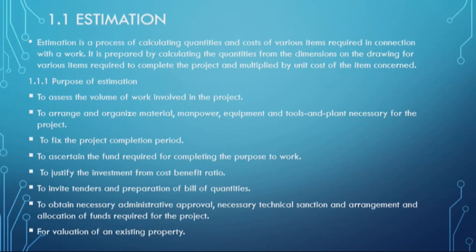To arrange and organize the material, manpower, equipment, and tools and plant necessary for the project. This will also help you to take equipment and tools, as a specific tool is required for a specific time and a specific point of work. Say shuttering. Shuttering is required for your roof, so it also helps you in scheduling to fix the project in a completion period of time. This will help us to complete the project in a given span of time.